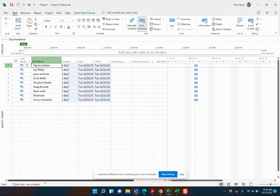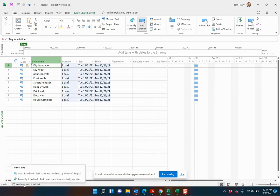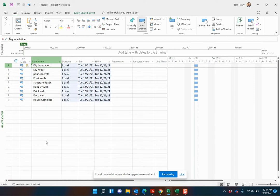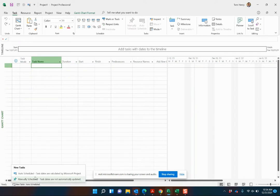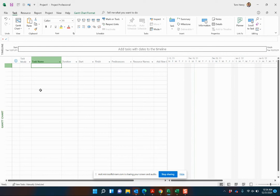Now I have auto scheduled switched on. This means that the scheduling engine is switched on. By default, out of the box, Microsoft Project comes with manually scheduled. What I'm going to do is control Z and we're going to manually schedule this time and see the difference.